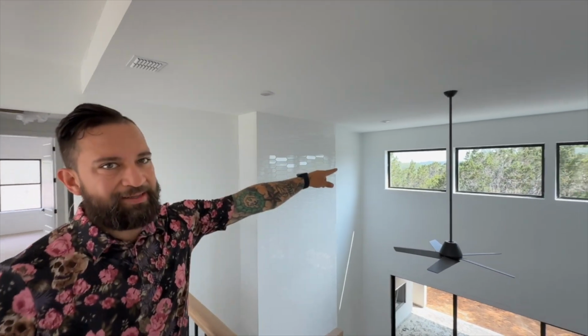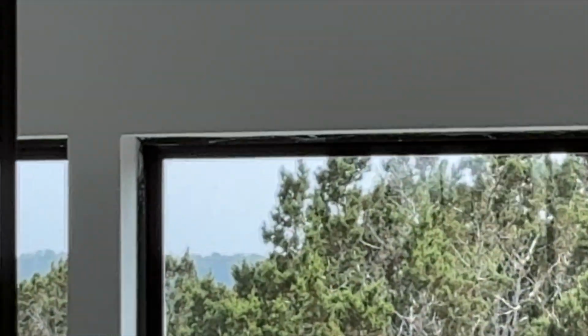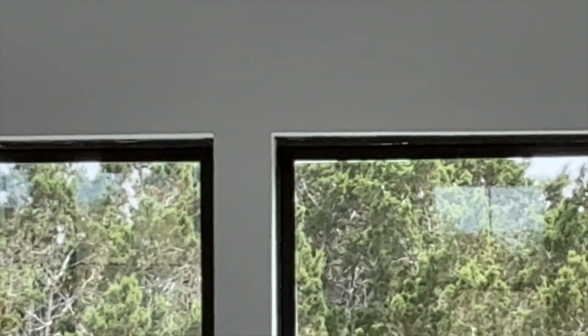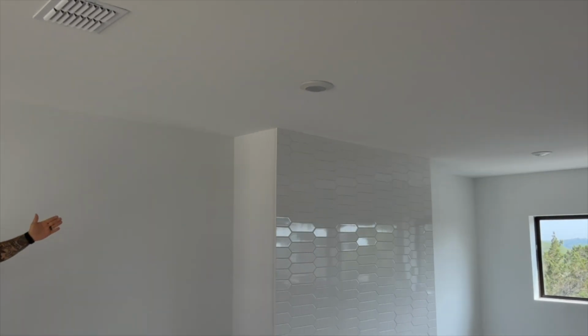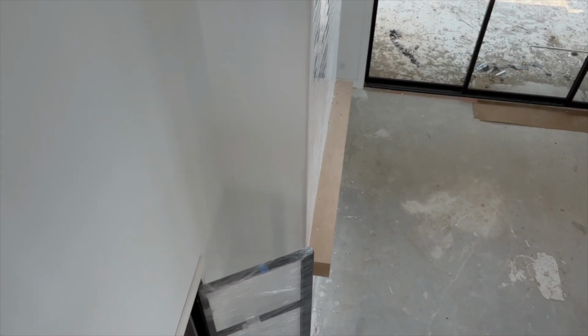Overspray and paint in the window, with the metal window right there. This can void the warranty when you have paint on the windowsills. That can cause a damage concern. It also can be missed during these walkthroughs, and the uneven tile would drive me nuts. There's no way that I would not advise my client to make sure that that is fixed. Also, some of that texture does have to be covered up with paint all across that 20-foot ceiling.